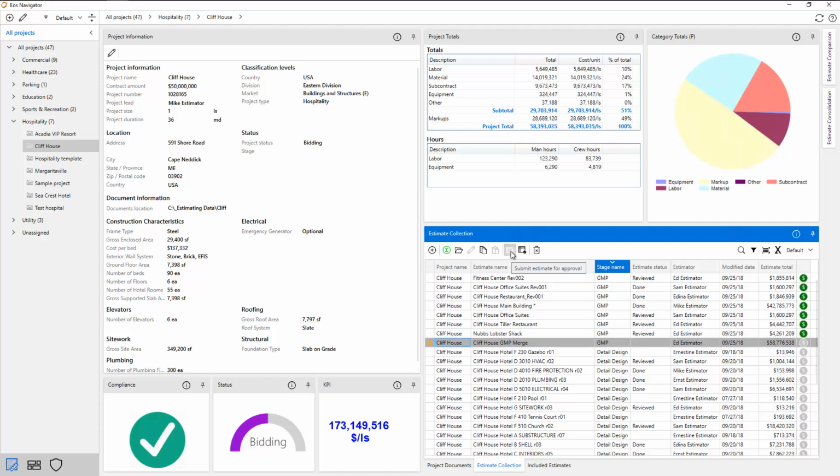We can formally approve the estimate before generating the final client deliverable. The approved estimate is now locked. This means it can't be changed after the client receives the final deliverable. Once delivered, you can monitor the project status. You can advance projects in progress to the next stage, publish awarded projects to project management and project history systems, and archive or purge lost projects.